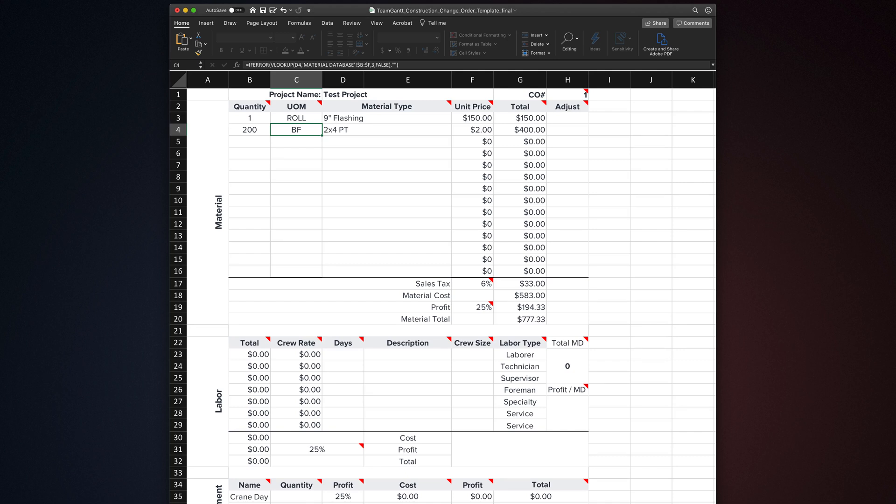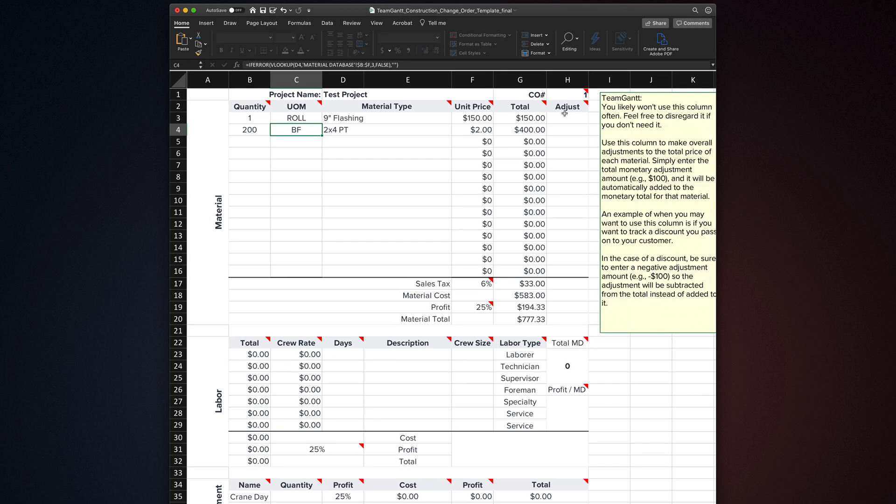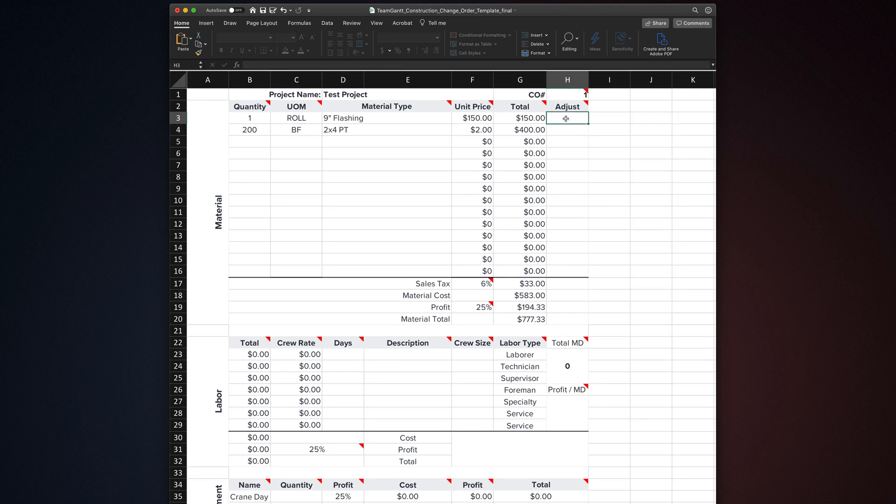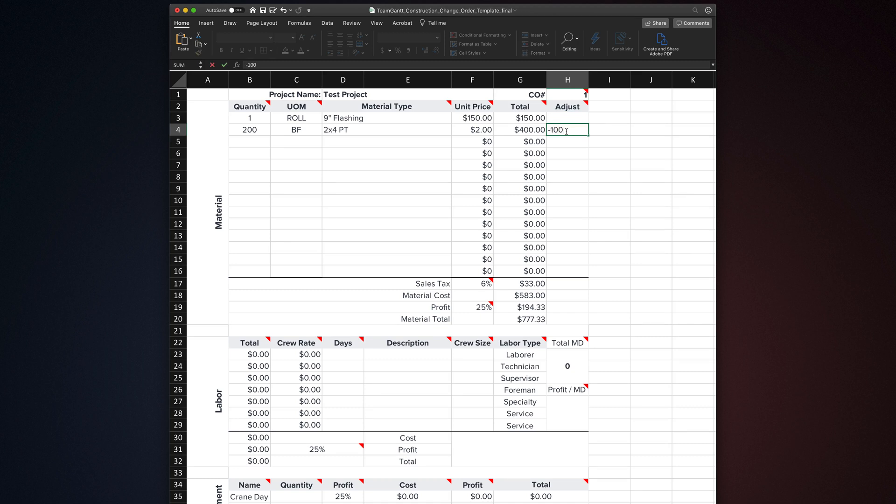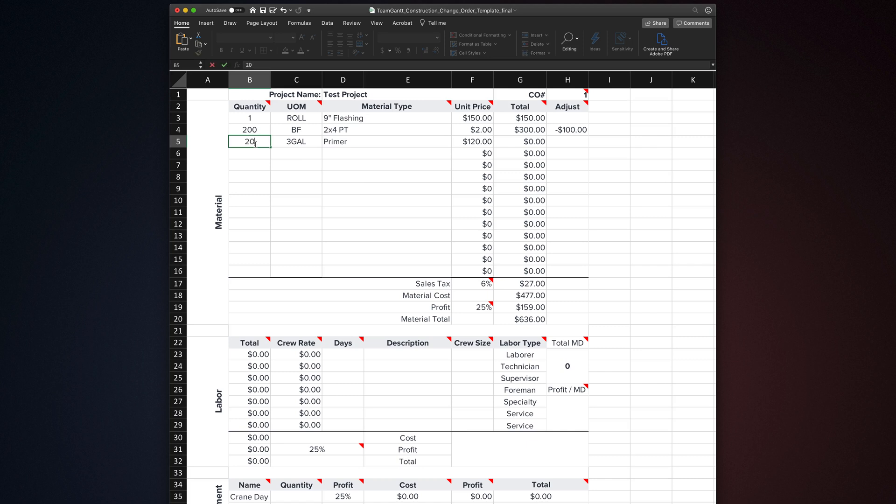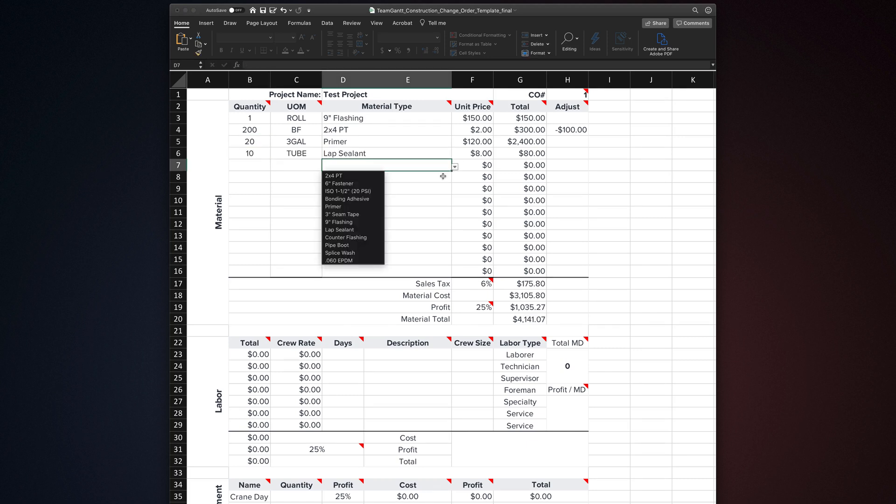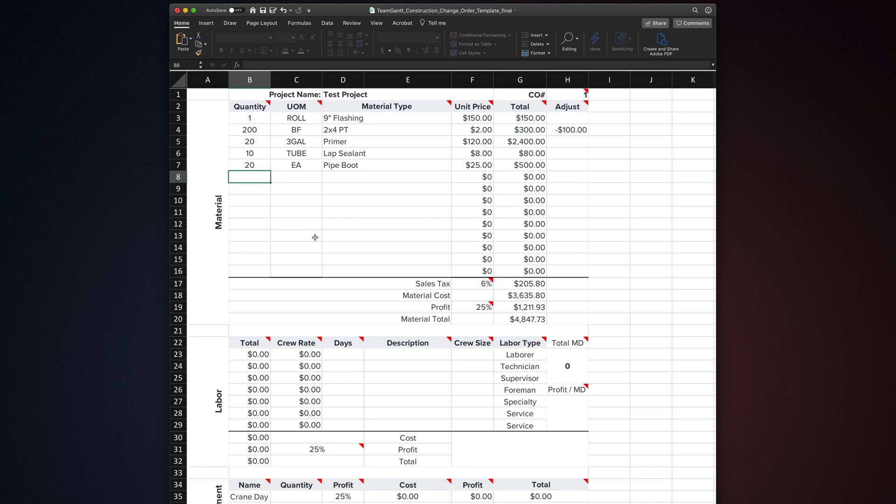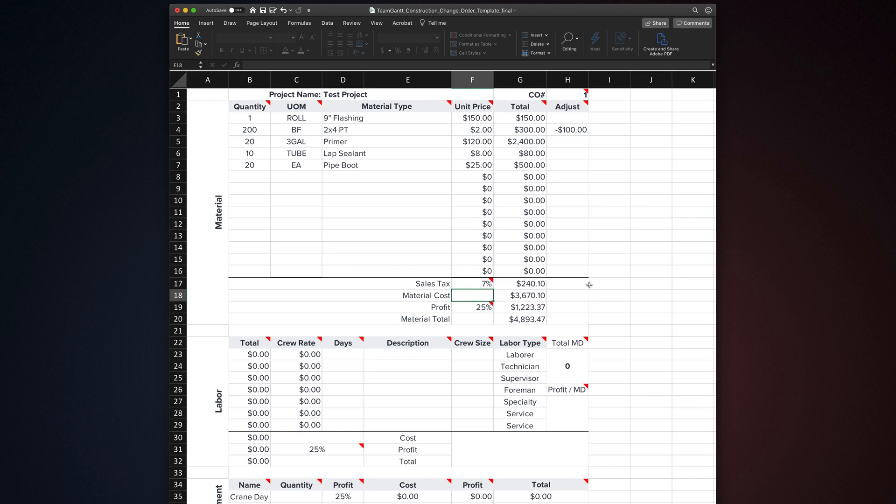For now, this is all dummy data that I input, but I'll show you how easy it is to edit and customize so you can store your own materials a little later. You can also just directly input materials that you don't want to store in your database. Just know that when you do, it overwrites the formula that links those cells to the material database. If you need to relink them, you can find formulas and instructions on how to do that in the instructions tab. Once you have your material selected, enter the quantity needed in the quantity column. You'll see that the total for the item is input automatically. There's also an adjustment column. You may not use this often. It's really to input things like discounts you want to give. Maybe for a product you have a surplus of in stock, but you still want to track. What you really need to know is that whatever number you input here, it's added to the total for that item. So if you're inputting a discount, just make sure it's a negative number.